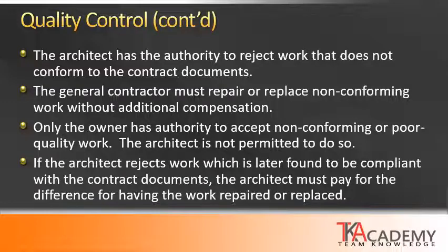If it is exposed and found that it does comply with the contract requirements, then it is up to the architect to pay for that difference. So as designers of record and architects, we want to be very certain that there is something faulty or non-compliant before we make any accusations or determination for the contractor to expose that work.